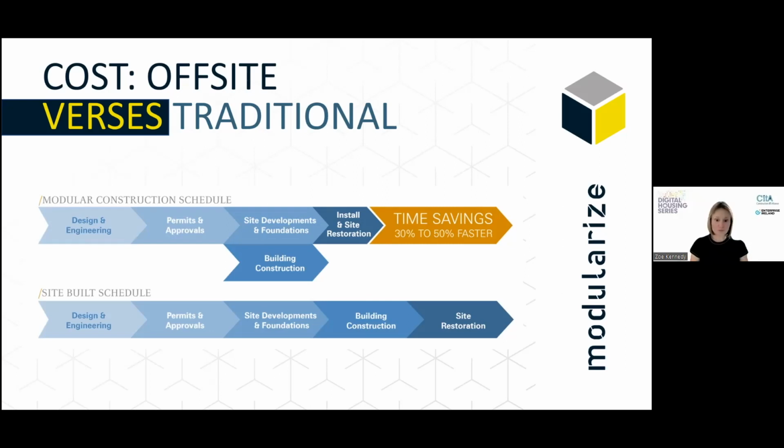When you take into account less time on site, and we start to produce the prelims and overall construction costs, even on a larger scale, especially on a larger scheme, these savings are going to be really, really significant. So a faster build time is hugely essential for the private rented sector, hotels and student accommodation sectors, and the faster we can move people into those buildings, the faster obviously we can make a return.